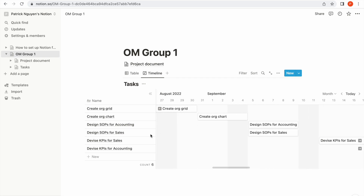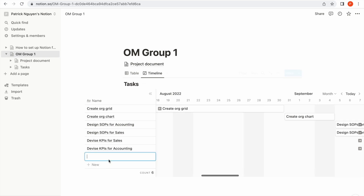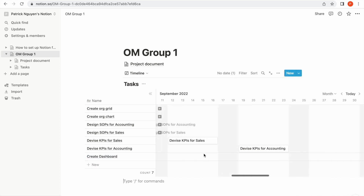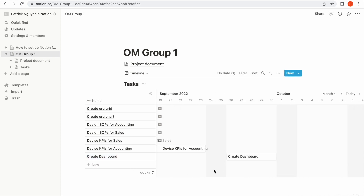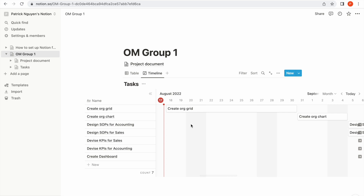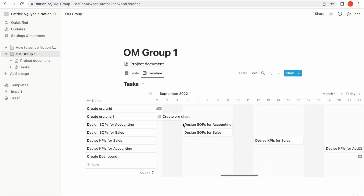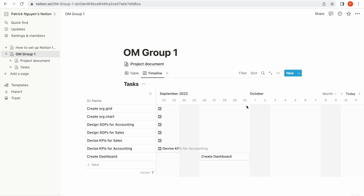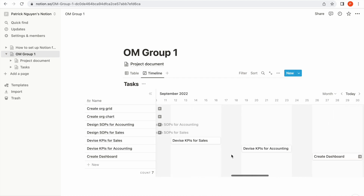If you want to add new items, you simply click on 'New'. For example, I need to create a dashboard, so I'm going to type in 'Create dashboard' and assign a timeline for it as well. Based on this Gantt chart, I can see that this Operation Management Group 1 project will last from August 18 to September 30, which is nearly two months.